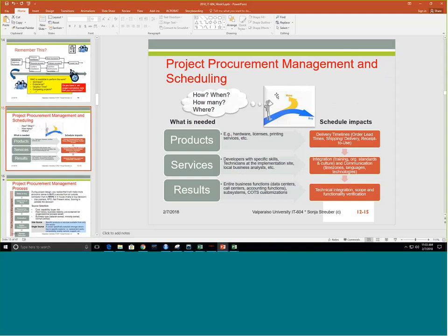And then, along with that, as we move from our WBS to our schedule, we need to understand, is there anything we need to order? If we need to order materials, how long in advance do I need to order them until they come in, especially if they are custom-made materials, let's say, custom built?